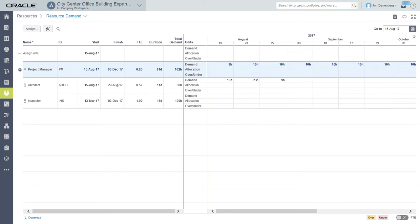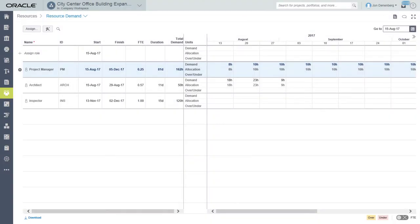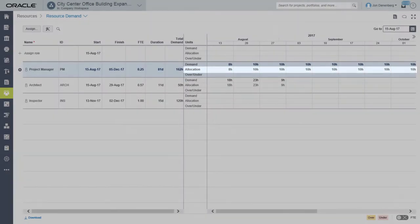A resource manager reviews the demand and either approves or rejects the request. If approved the demand is converted to committed allocations on the spreadsheet.